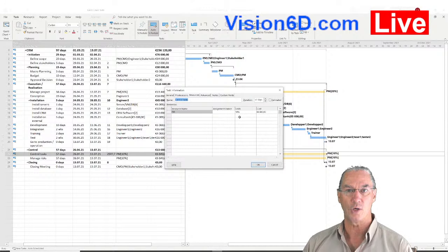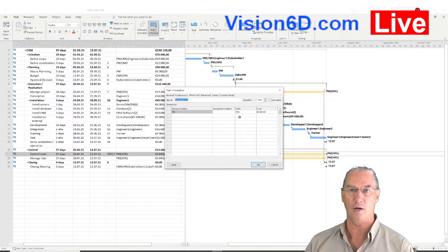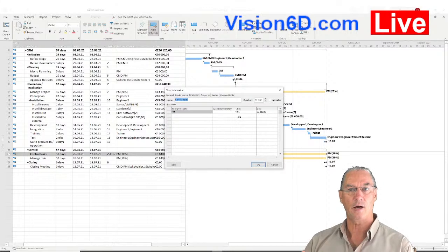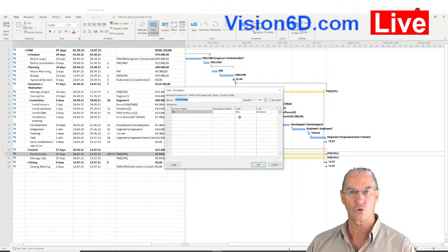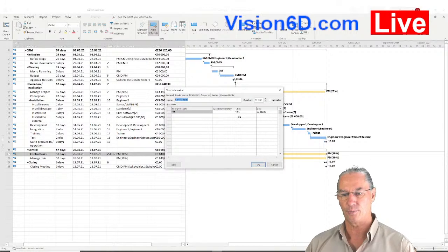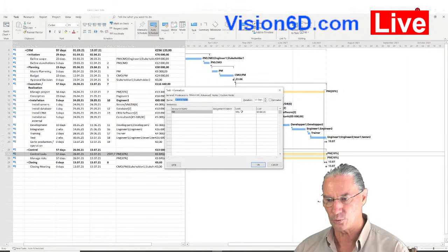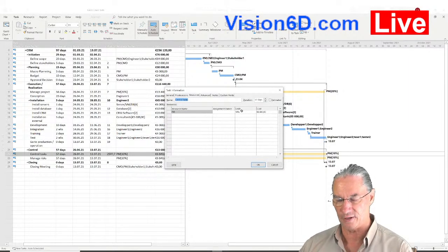Usually in projects we consider, depending on the area of the project, depending on the industry, 10 to 15%. There are areas where it's 20%, there are areas where it's much more. It's a full-time job doing controlling and all this, depending also on the size of the project. So here it's the way by which I have defined the project manager.